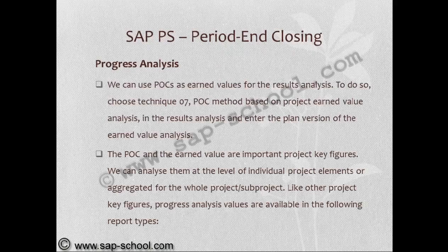We can use percentage of completions as end values for the result analysis. To do so, we have to choose the technique 07 POC method based on project end value analysis in the result analysis and enter the plan version of the end value analysis. The percent of completion and earned value are important project key figures.